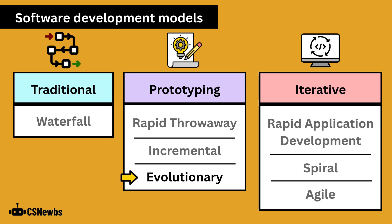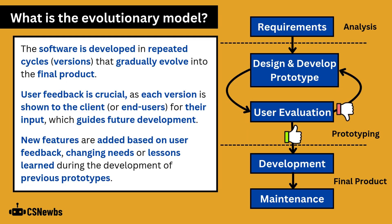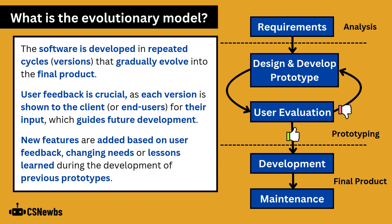The evolutionary model is an example of software development that focuses on the use of prototypes. The software is developed in repeated cycles or versions that gradually evolve into the final product. User feedback is crucial, as each version is shown to the client or end user for their input, which guides future development. New features are added based on user feedback, changing needs, or lessons learned during the development of previous prototypes.